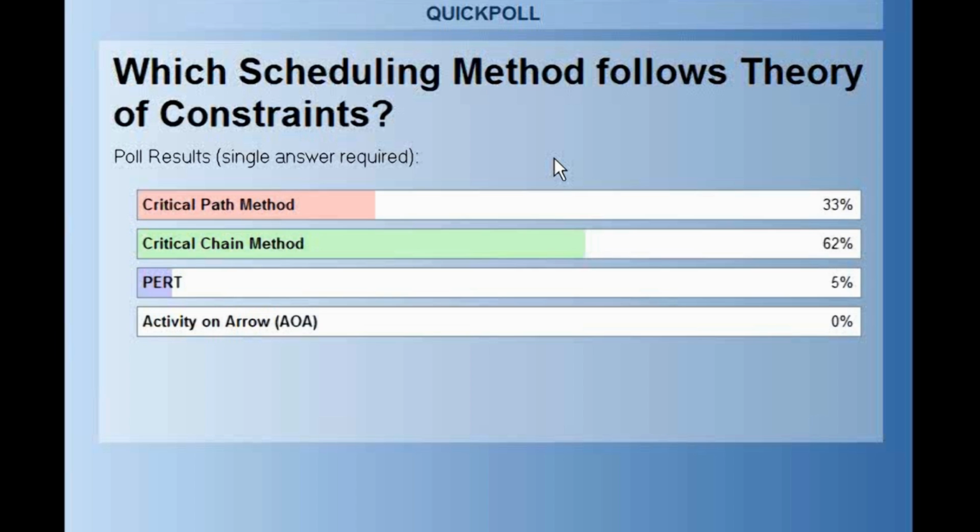Like if I don't have developers, I don't allocate developers in a project schedule more than what I have. So when I put the constraints as per my available manpower, and when I remove buffers from the activities, I come up with a critical chain. But when I am removing buffers, I put them at the end of the path in order to make sure that if something goes wrong in between, the buffer should be able to take care of the volatility.